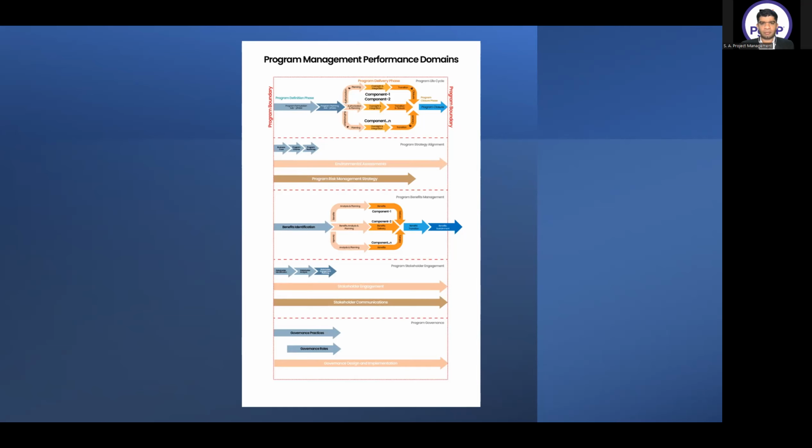So that's the steps, only from the ECO perspective, for the closure phase. We should be very mindful and remember these steps. So basically, what will we do? We will make sure that we update the lessons learned, because from the project standpoint there would already have been a lesson learned. Now with all the stakeholders of the project or all the stakeholders of the program, we will look at the cumulative lessons learned registry to find out, is there anything that we can improve?